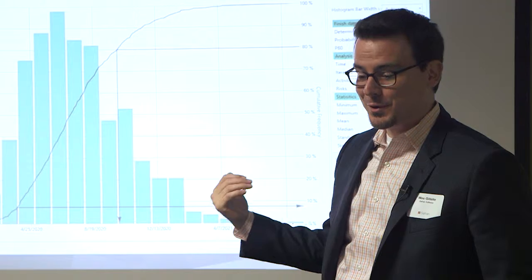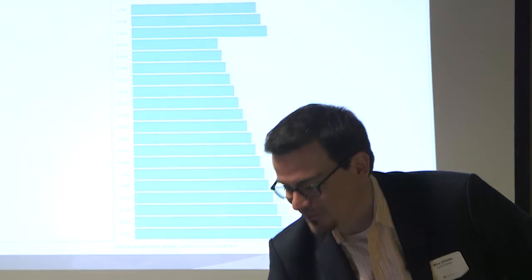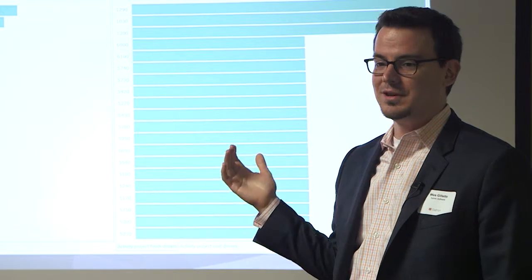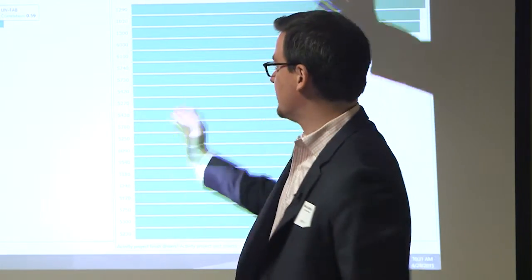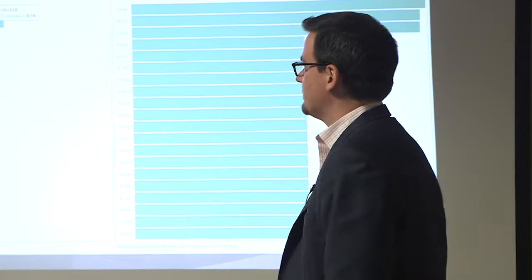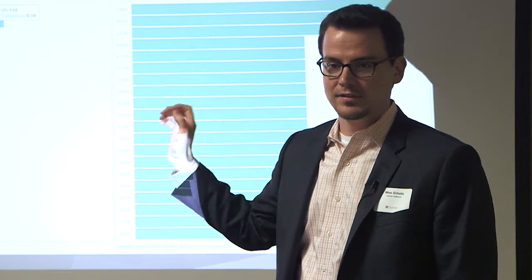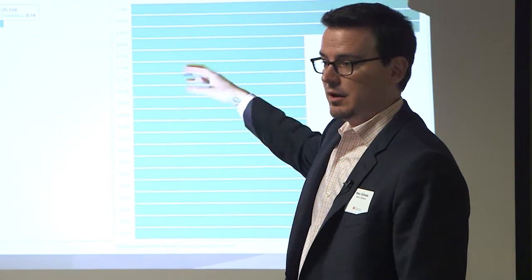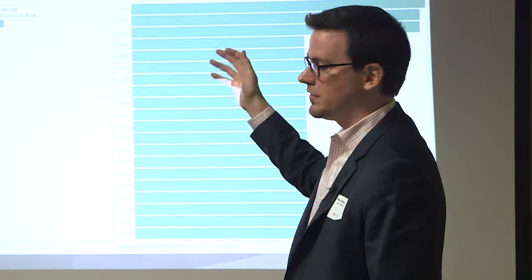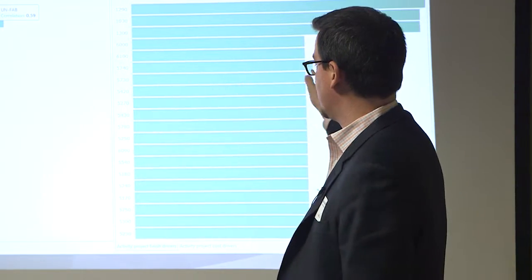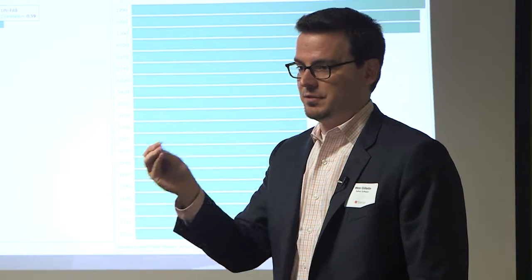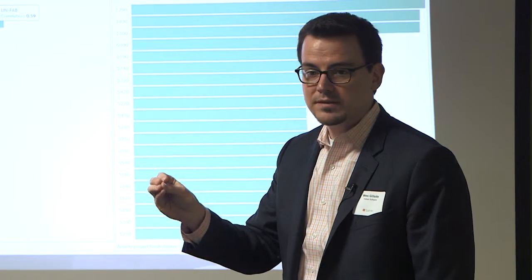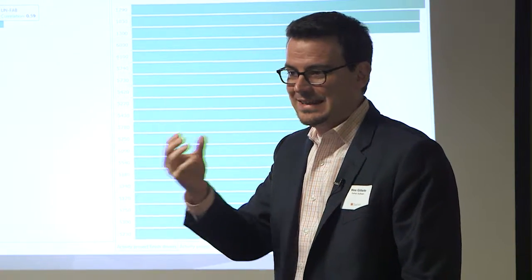One of the things that we brought back that we hope to get rid of is the report that Nathan talked about, which is often used but never understood, which is doing the sensitivity analysis and measuring correlation, right? So the number one question is, well, what does the 0.59 represent, right? And so there is some value. I trivialize it a little bit, but we think we've improved vastly on it, and I'll show you that in a second. It does give you some insight into what are the things that will typically drive, from a risk perspective or from an activity perspective, my overall project, right? But invariably the question comes, but what does the 59% mean? Is it 59% of the time? Is it 59% of the schedule delay? The cost? Like, give me more, right?